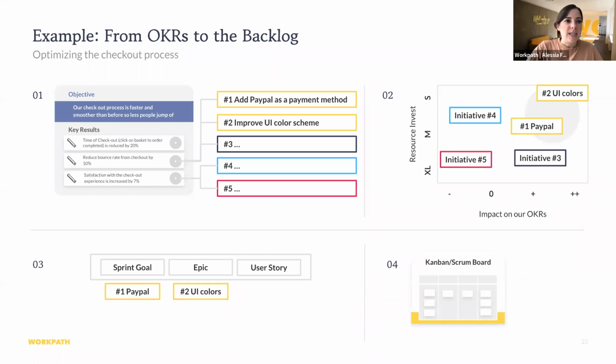All right, at the end of the quarter, we have an OKR that is incomplete, but still valid for the next quarter. Do we create a new OKR or just extend the original to the next quarter, specifically if the key results need to be adjusted? What I would always do is never just copy paste an OKR without checking it first. So understanding what value we have created. And if we were very specific in the value and the key results, we probably need to change it anyway. So cutting it, slicing it a bit differently, and then dragging it into the next quarter. That's what I would always do.